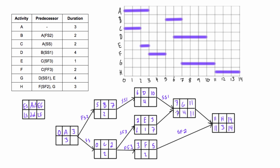Looking at activity D, this is a start-start relationship with a lag of one, so G can start one day after D starts. That applies to the late start as well. G's late start is seven, and it starts one day after D, so we subtract one and put six in for D's late start, then add the duration to get a late finish of ten. Similarly for activity B - another start-start relationship with a lag of one. We take G's start, subtract one, and put five in for B's late start. Five plus two is seven for the late finish.